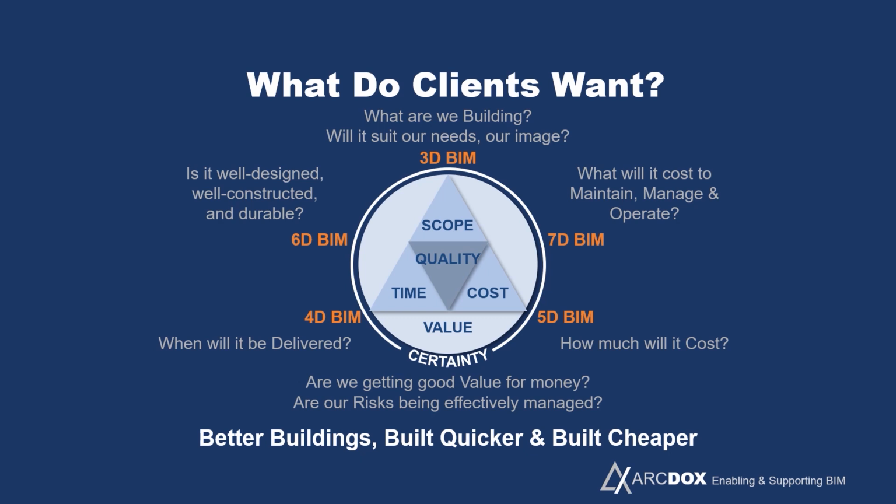For instance, the Lean Construction Institute have said that over 30% of the cost of construction is waste. So money spent on things that add no value to the building itself, things like duplication of work, abortive work, rework, wasted materials, delays, disputes, even litigation.